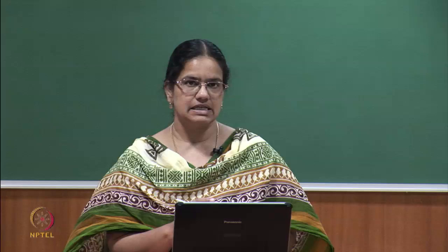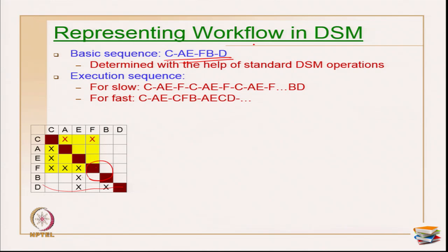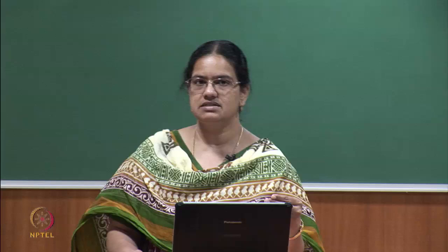Now let us see how to represent workflow in a DSM. Representing workflow in DSM - suppose if I want to use the DSM example in a construction phase. Researchers have identified two ways of executing a sequence: one is called the basic sequence and the other is called the execution sequence. The basic sequence - C first, then A and E in parallel, then F, then B activity in parallel with D, then D is executed - is what you get from finishing the tearing process.